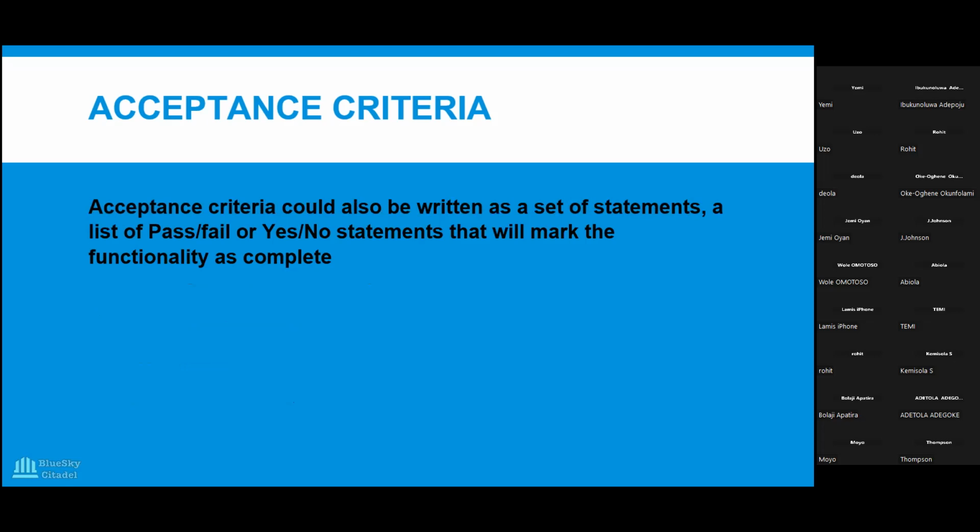Let me give you a good example. On the former project I was working on, I was, like I said, the only BA in the development team. It was a proper development team. So I was speaking with the stakeholders, doing requirement solicitation, coming back to the team, doing refinement, sprint planning, and all that. For the acceptance criteria in that team, we would say, given I am an investment analyst and I'm on this portal, when I click on that, then I am redirected to that. When they were testing it, they would go one by one, given this, when that, then that, and they would check it. That was the format it was written in. We were using Gherkin syntax then.